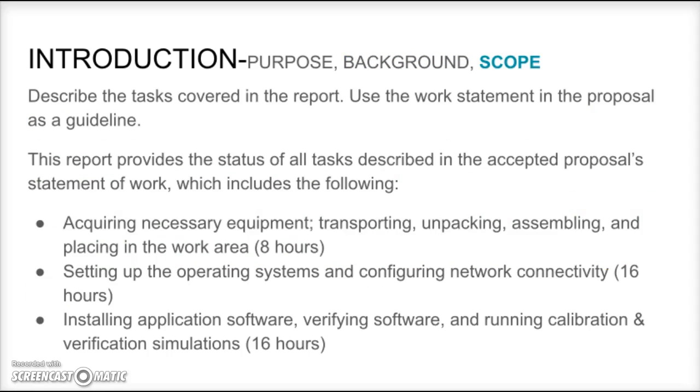The final move in the introduction has to do with the scope, and in the scope then you would describe the tasks that are going to be covered in the report, and you can go back to your work statement in your proposal and use that as a guideline. So this report, here's the example, this report provides the status of all tasks described in the accepted proposal statement of work, which includes the following.